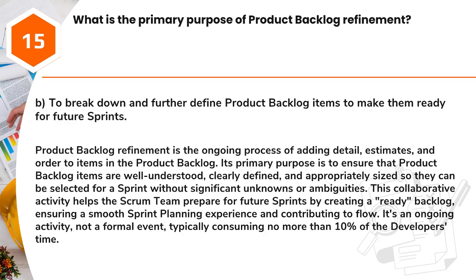This collaborative activity helps the Scrum team prepare for future sprints by creating a ready backlog, ensuring a smooth sprint planning experience and contributing to flow. It's an ongoing activity, not a formal event, typically consuming no more than 10% of the developers' time.